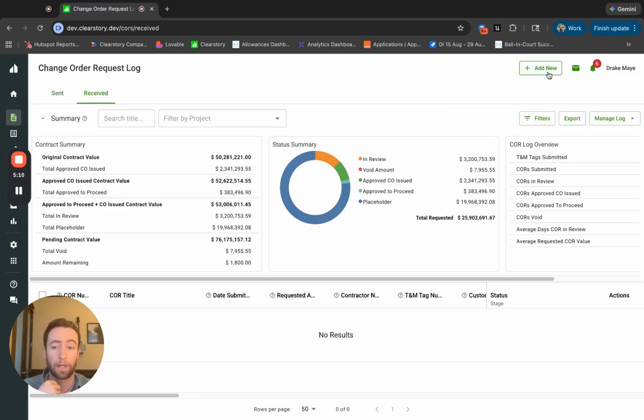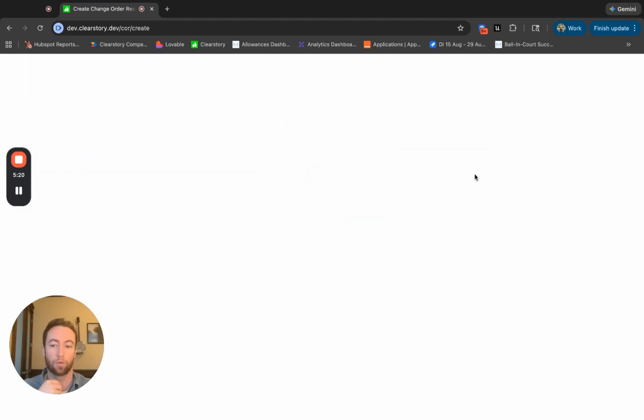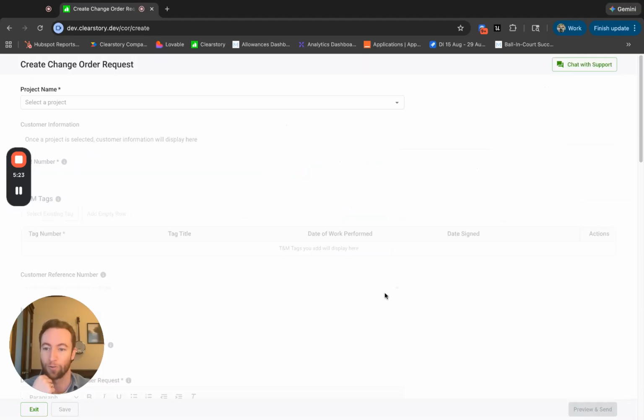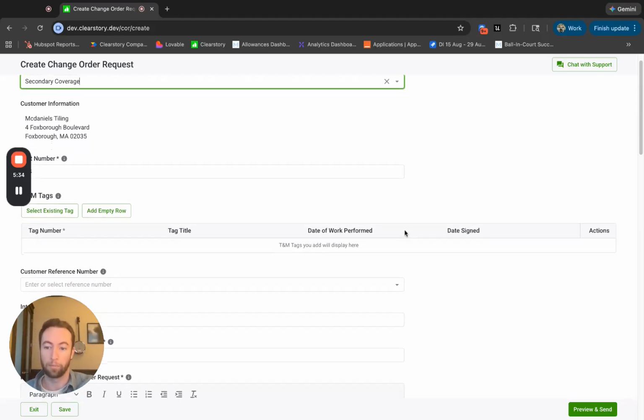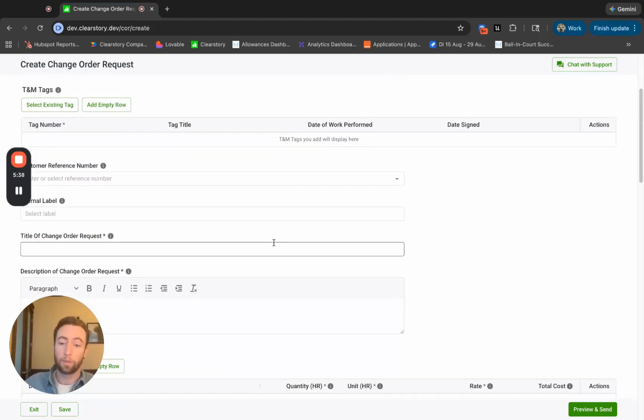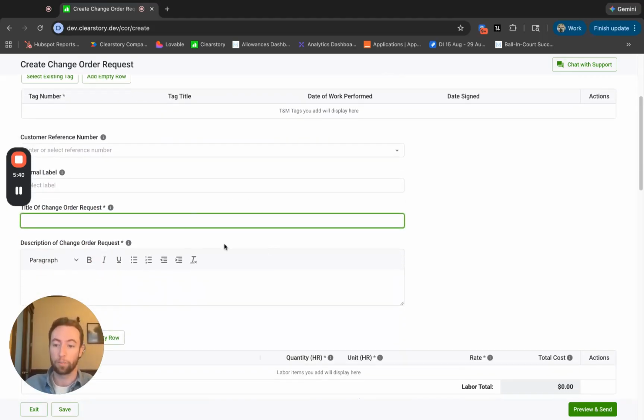So now let's take a look at what the change orders look like within the create change orders. We allow change order reason categories to be created for all of our existing change orders, whether they're uploaded, bulk imported, or manually created. For manually created ones, we use the title and description. For uploaded ones, we are typically using any files that are attached and extracting data from them. So say within here, I say design change.